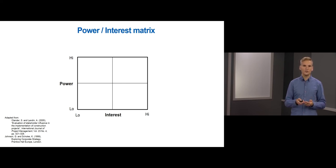The tool offers a two-by-two matrix with two dimensions of Power and Interest that seek to analyze two questions concerning each stakeholder at a given time: How interested is each stakeholder to influence project decisions, and how much power does each stakeholder have to influence project decisions?